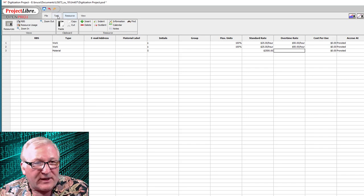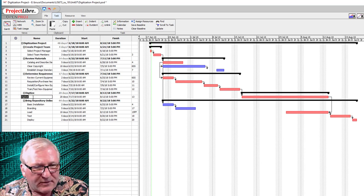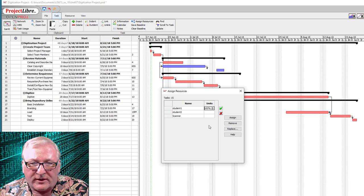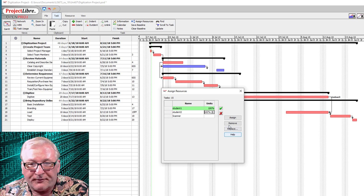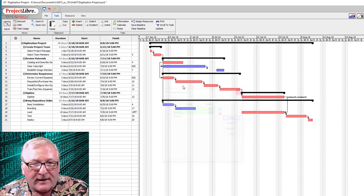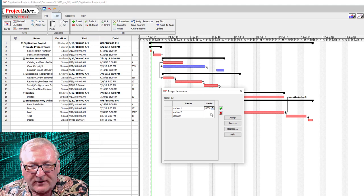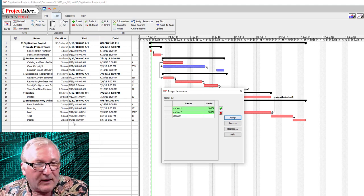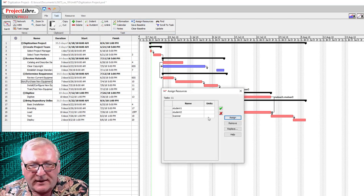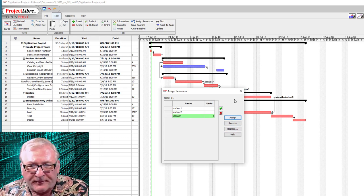Now that resources are entered, we go back to our Gantt chart. Looking at the Digitization task, we can assign resources — 100% of Student 1 and 100% of Student 2. Then for Train and Test, we assign 100% of Student 1 and 100% of Student 2. And for Requisition Purchase New Equipment, we assign the Scanner resource — we're going to buy one scanner.